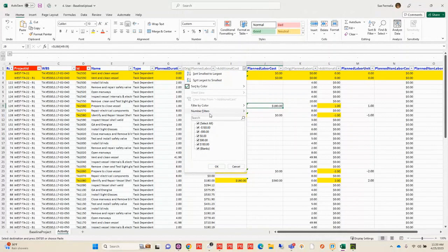And then once it is completed, let me just look at this FP spread 1. We can see that I have my financial periods out here that have zeros in them right now. My FP spread 3 is the same. And when I refresh this, it's going to put my progress in. And then in the case where I was updating my financial periods, I've now got those values in my financial periods for each one of those activities.